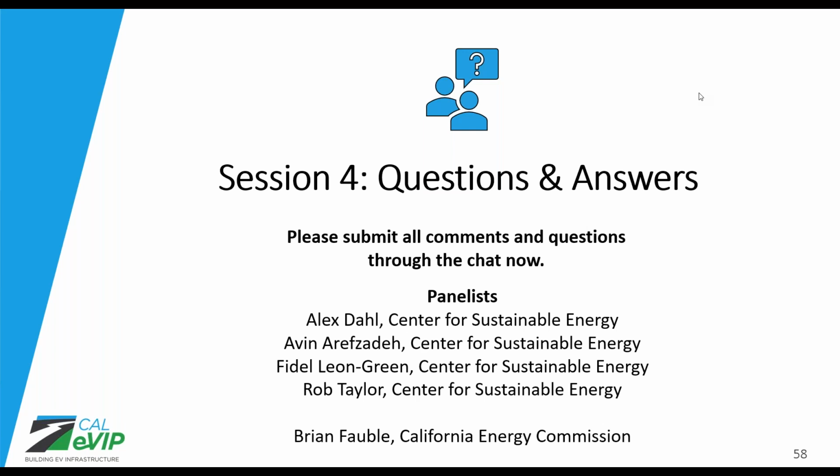Okay, and Fidel, a couple questions, combining a few of them in regards to funding caps. What is the cap on total funding? And then also, is the $2 million cap you mentioned before per site or per developer? The total funding available will be $30 million. That is $10 million for the central region and $20 million for the eastern region, totaling that $30 million. And then the up to $2 million cap applies to the site and application, since only one application will be accepted per each site.